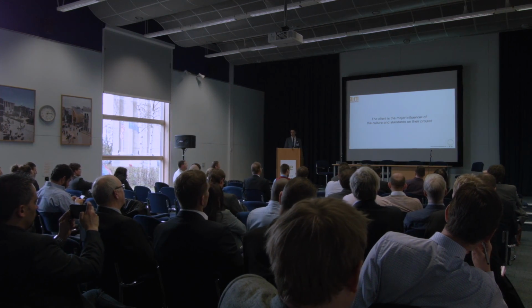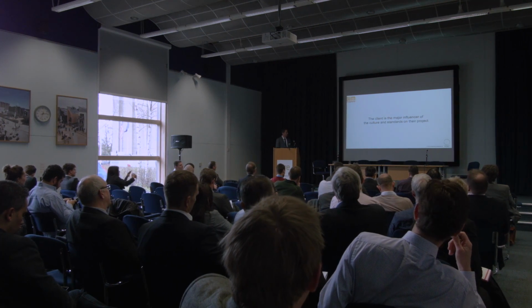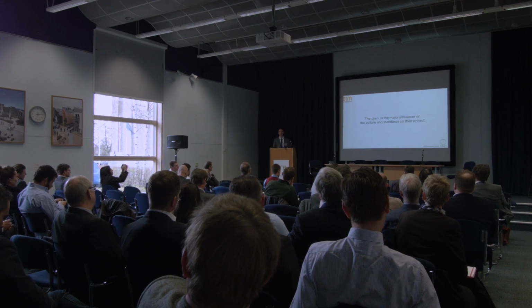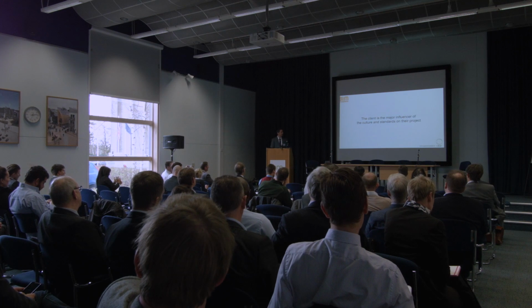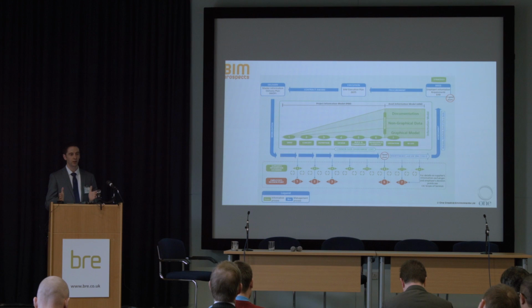So it's worth stating, the client is the major influencer of the culture and standards on their project, and this is absolutely true. If the client doesn't ask, the client doesn't get. Or if the client asks too late, he might get, but he's going to get charged for it. He's going to get charged a lot more than stating it right at the outset. It comes back to this, and we don't need to spend too much time on here, all I need to do is echo the importance of what has already been stated. The importance of setting those employers' information requirements out right at the start. This is going to enable the project to have consistent delivery standards.